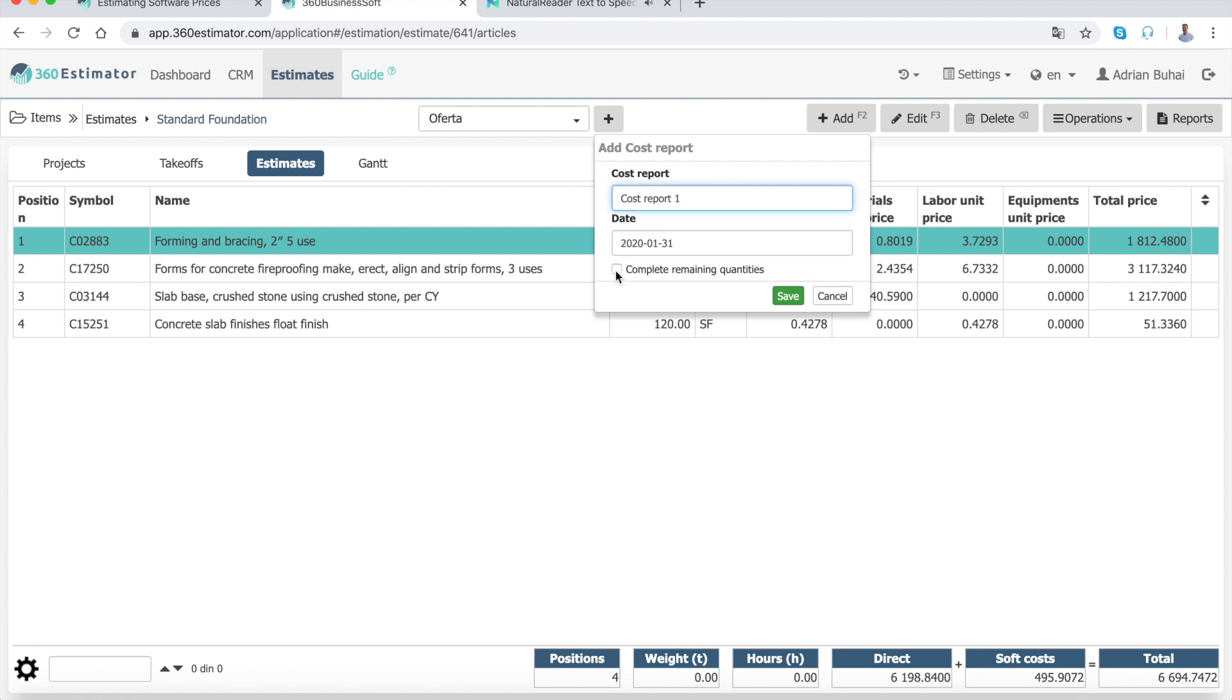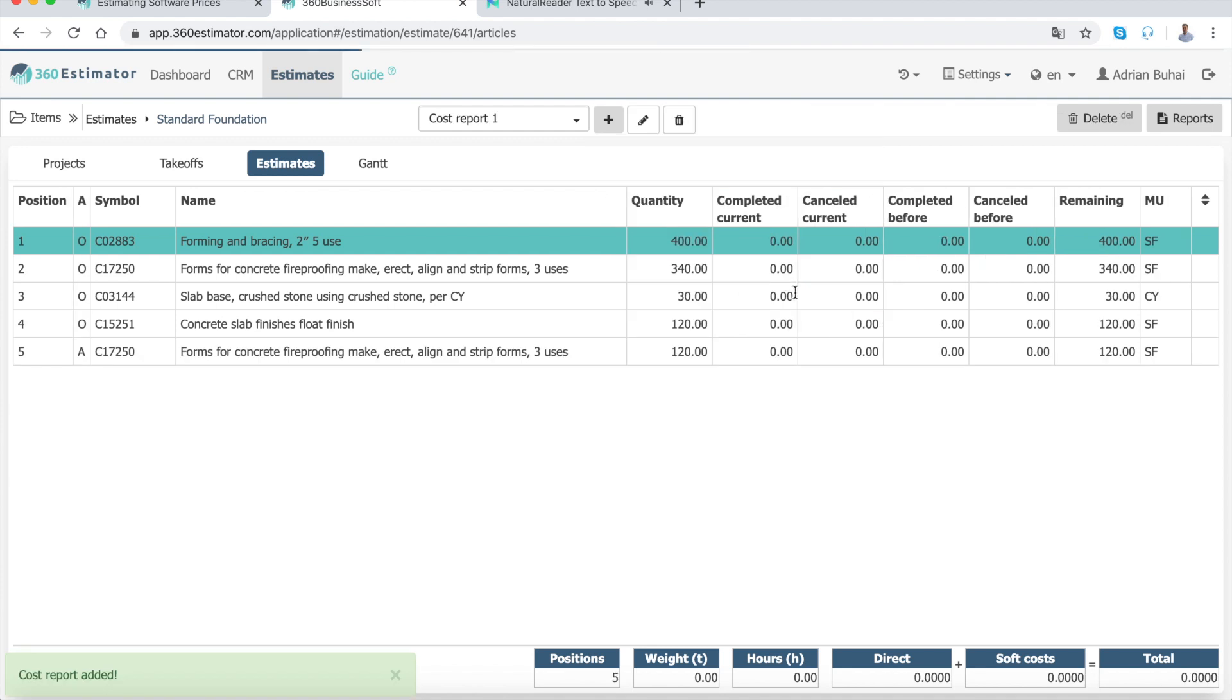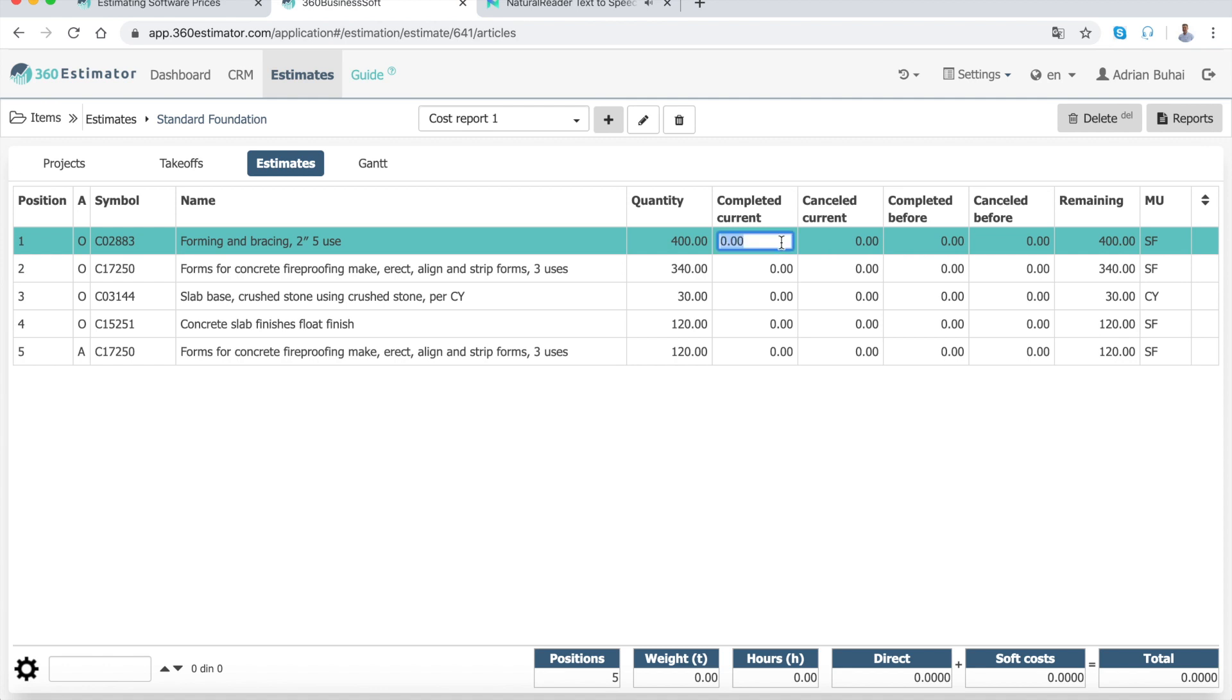In a cost report, you can have three types of quantities: completed, canceled, or added. First, enter the quantities completed. Repeat the operation until you finish your cost report.